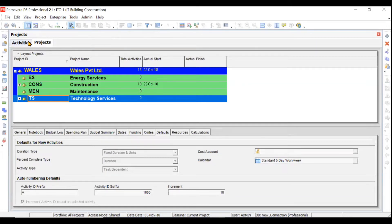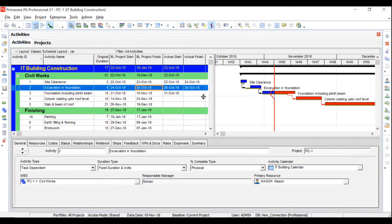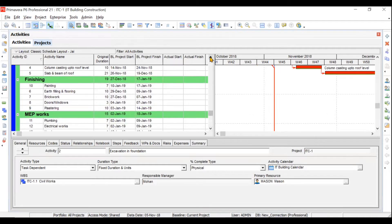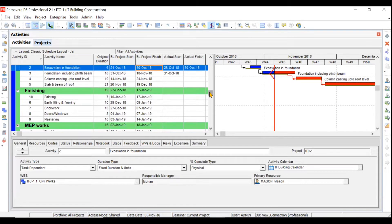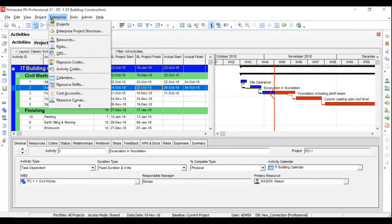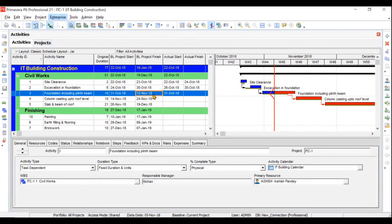In the third video we'll take one example, then proceed to creating a new project. We will create an IT building construction project as a sample, with 13 activities under civil works, finishing, and MEP works. This is a real-time project — short, but it will help you cover the complete aspects of Primavera P6. To create a new project, go to Enterprise > Projects, then click the plus button, press Insert on your keyboard, or use Ctrl+N.